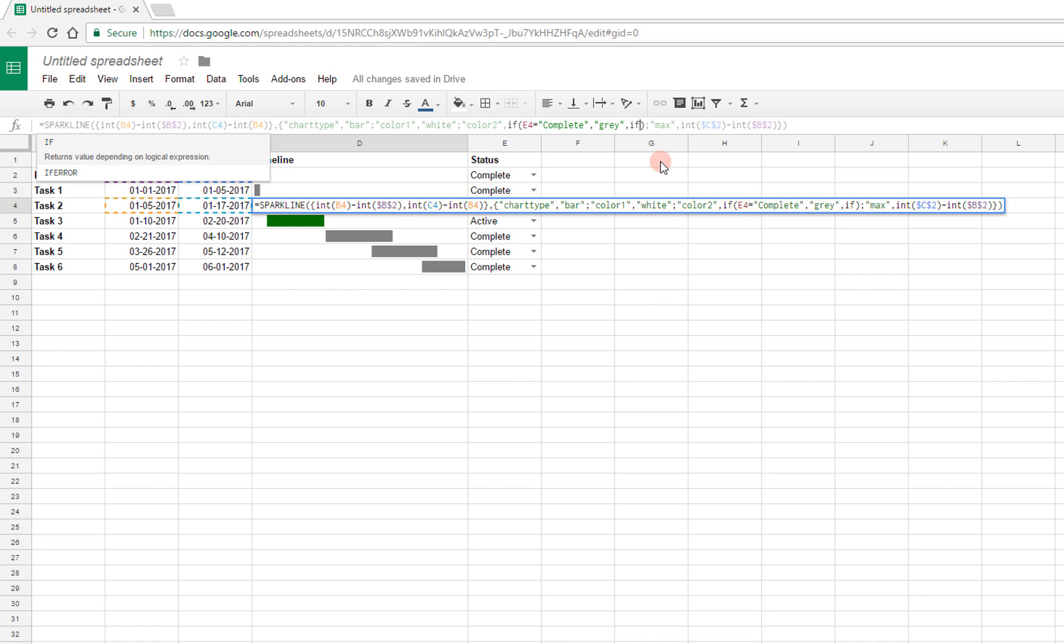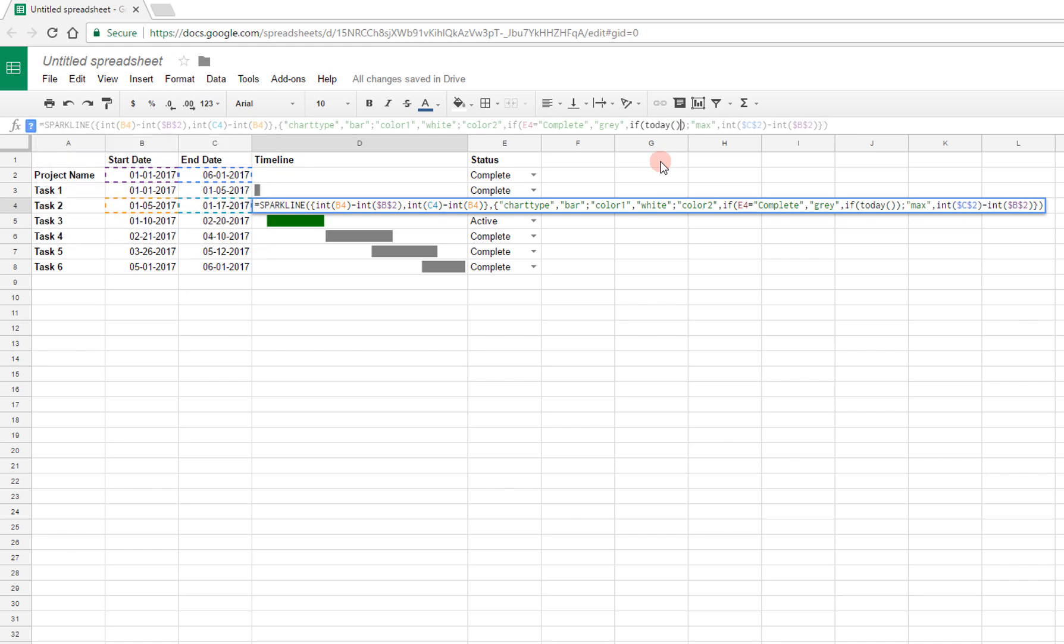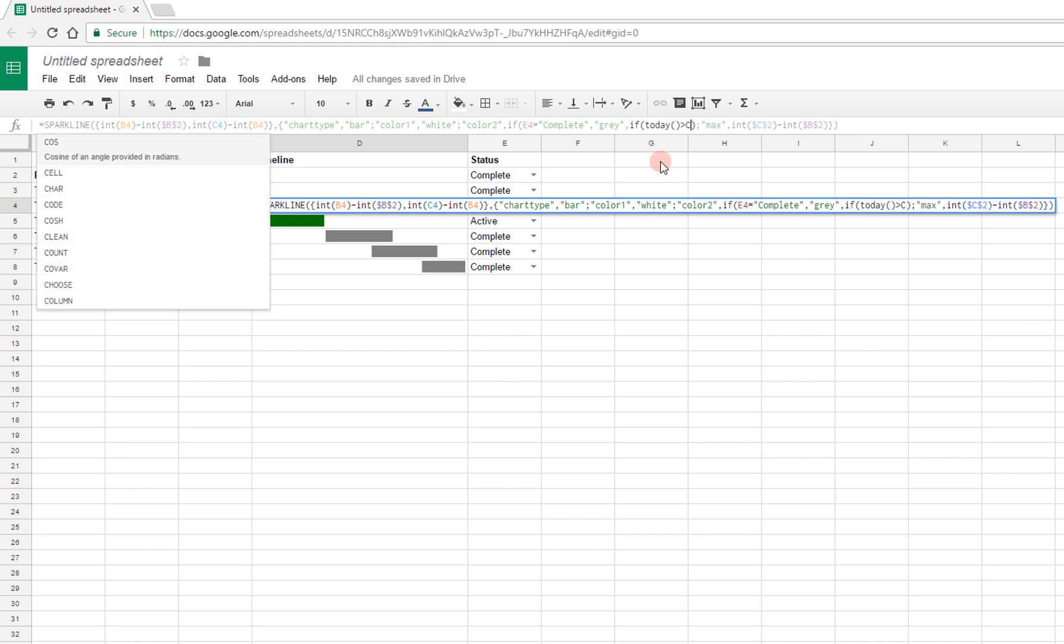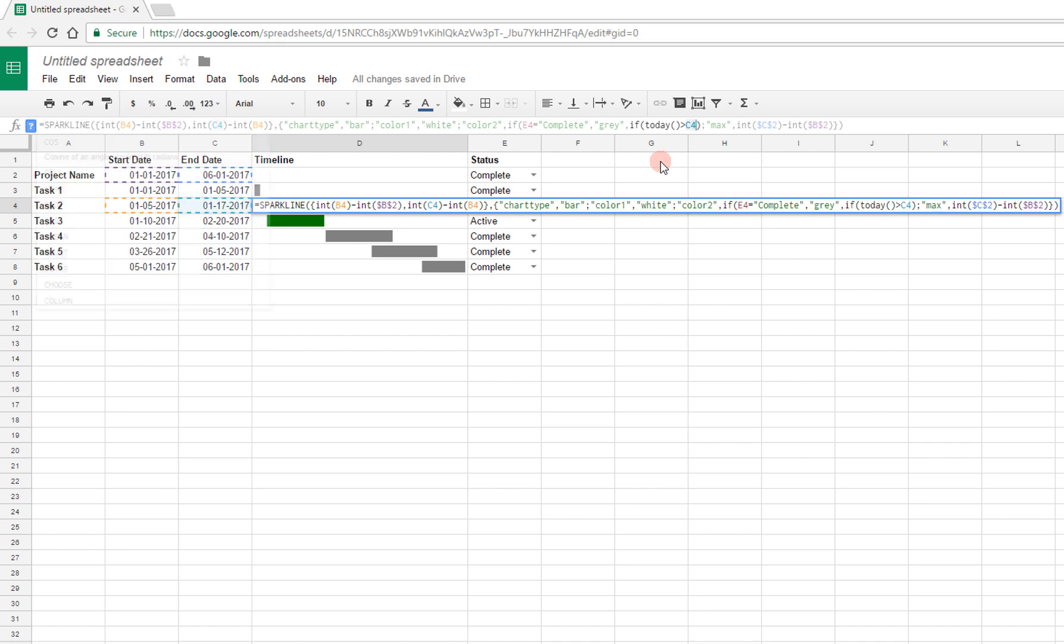So try to follow along, and I'm doing this only so that you can make modifications in the future if you would so like. Otherwise, just look at the template that I'm going to link below. So here I'll say, if the date today, I can use this function today, is greater than C4, that is the end date, I'm going to mark this as red.